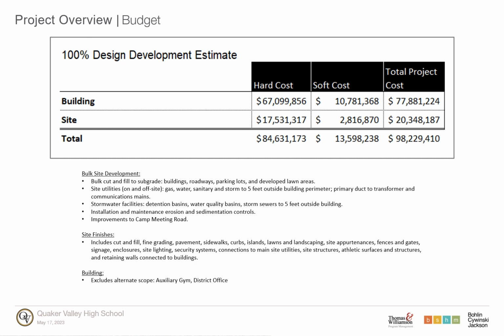I have also provided those costs in two components: the hard costs, which are the estimates of what the contractor's bids will be, and the soft costs, which are the costs budgeted for professional fees, contingencies, permits, approvals, testing and monitoring, movable fixtures and equipment, printing, advertising, and other miscellaneous project-related expenses.